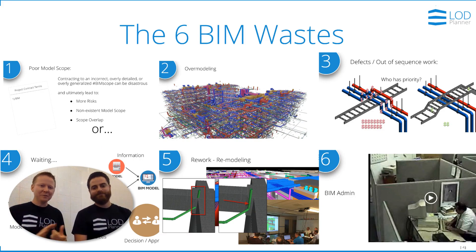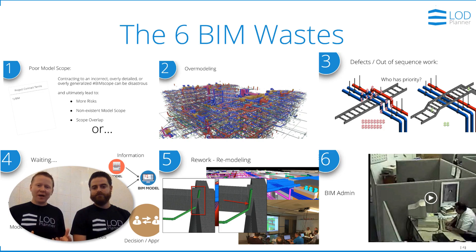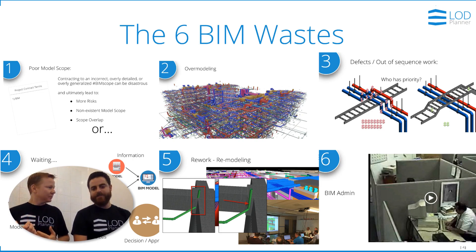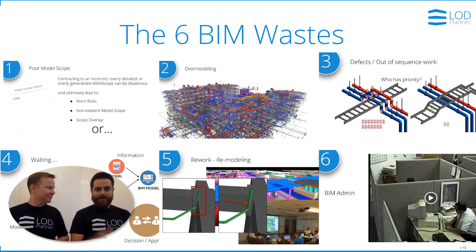So there are the six BIM wastes. First, model scoping — when we don't have a good model scope we end up with miscommunication and contractual problems. Second, over-modeling — modeling something twice, by two teams, or having gaps and scope holes. Third, out-of-sequence work leading to defects, and bad modeling which is a defect as well. Fourth, waiting — for information, model deliverables, decisions, or even for models to open. Fifth, rework — doing something for the second, third, or fourth time, finding yourself in four-hour coordination meetings over and over again.